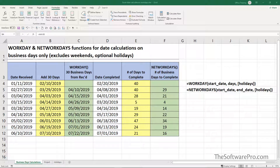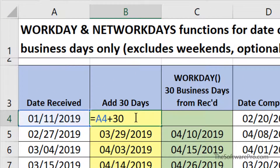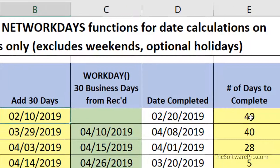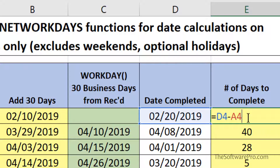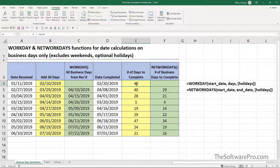In this example we have several basic calculations for dates. What if we have a deadline of 30 days for the completion of a process? This first formula simply adds 30 to the date received. These date calculations work because every date in Excel has a numeric value behind it — it starts at 1 at the beginning of the year 1900 and grows incrementally every day. The second example calculates the difference between the date received and the actual completion date. While these calculations may be helpful for some projects, they don't exclude weekends. And what if you'd also like to exclude holidays?